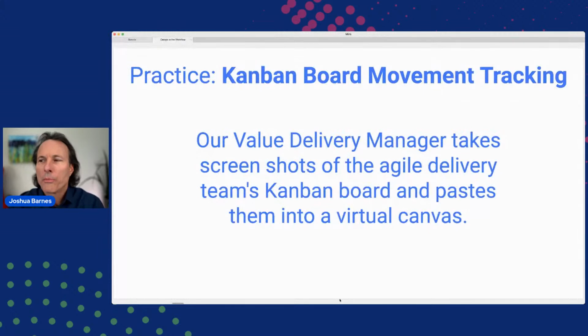So Kanban board movement tracking, right? Our value delivery manager, the person in this role, takes screenshots of the teams that they're working with or observing, of their Kanban boards, on a daily basis.